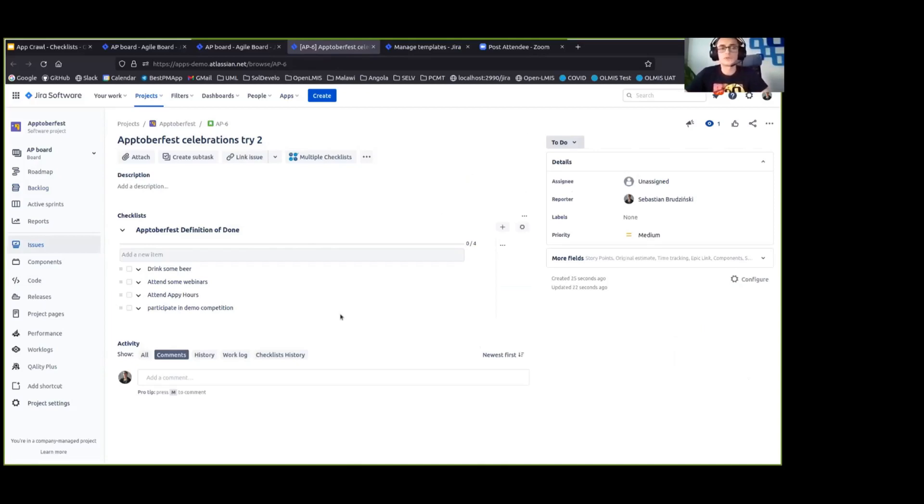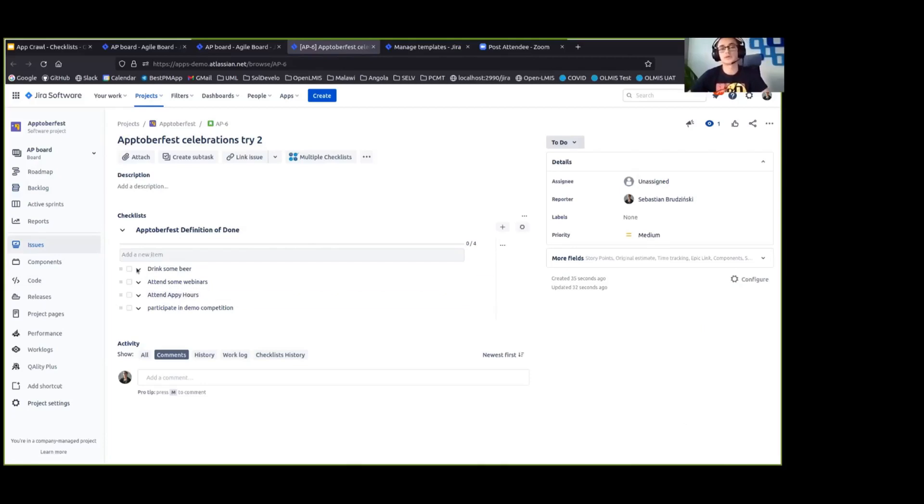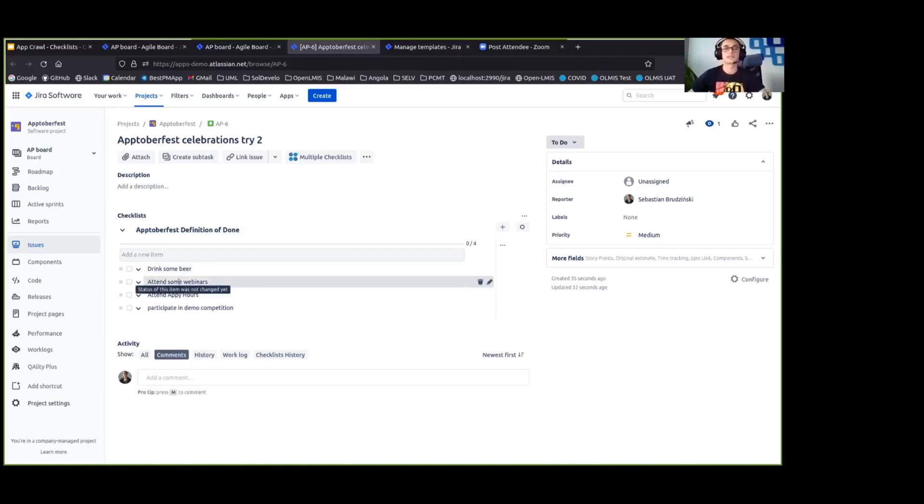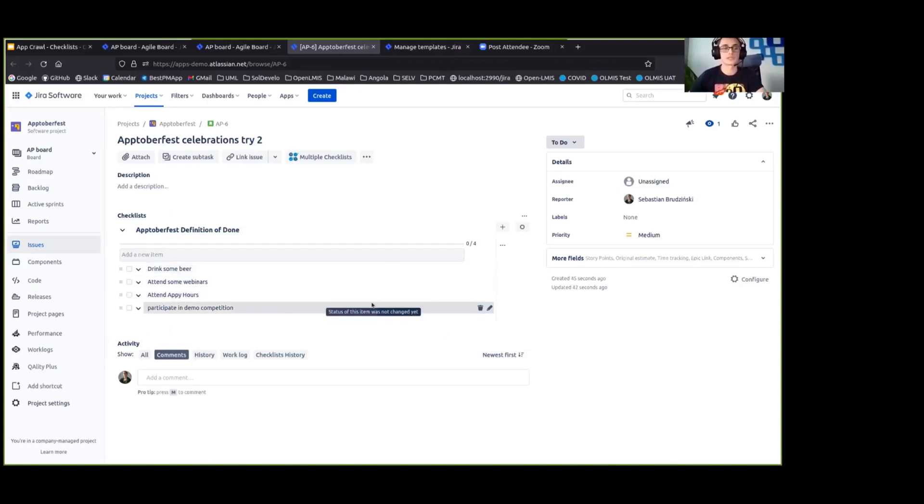What's more, we wouldn't want to move that issue to done unless we complete all of the checklist items. So we don't want to say that something is done unless it really meets all of our criteria on the definition of done checklist.